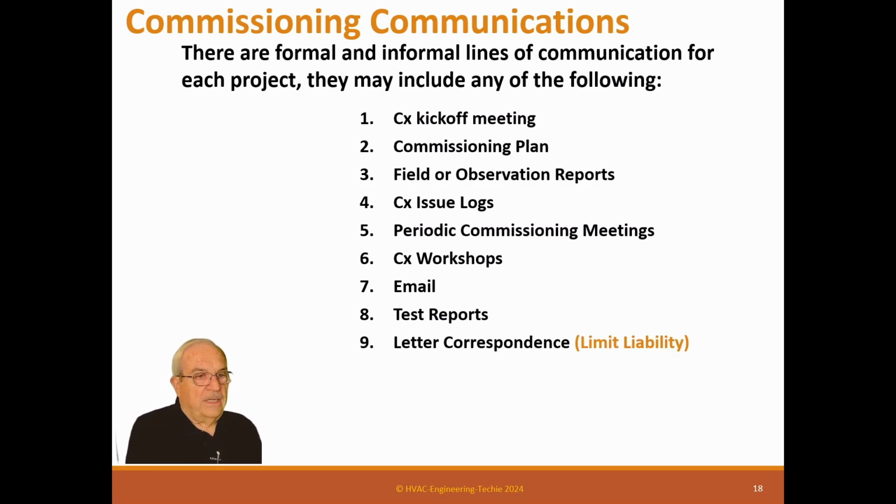Letters. Now, you don't have to do this, but I actually only use letter correspondence to alert everybody that I have found a life safety issue. Now, why would I do that? I can still make it just an issue log. Well, I'm limiting my liability. I'm doing a formal letter that documents I found this problem, and if you don't correct it, it ain't my problem. So it's limiting my liability. And I've only written a letter on one project in my entire life, but that's what I do with that.